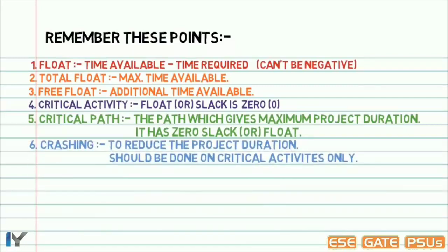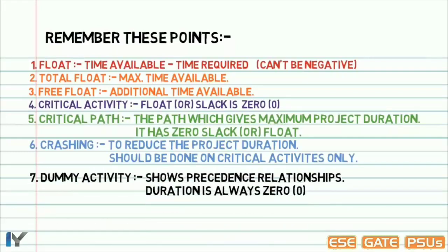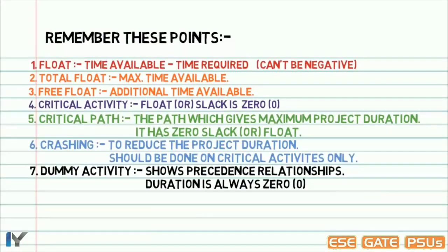Crashing is to be done to reduce the project duration, and it should be done on critical activities only. Dummy activity shows precedence relationships only, and it has zero duration. Fulkerson's rule tells us about numbering of events.